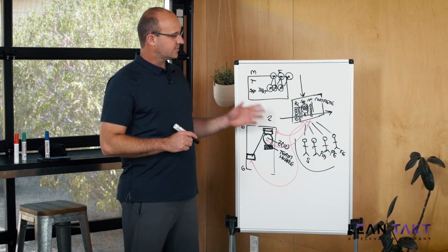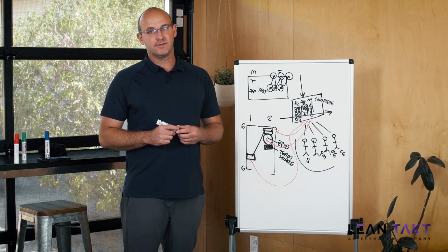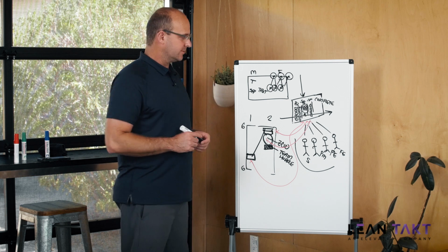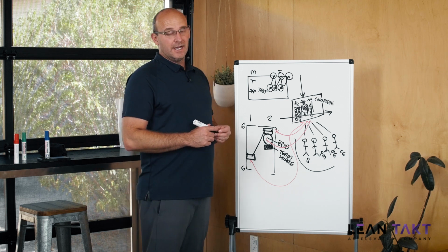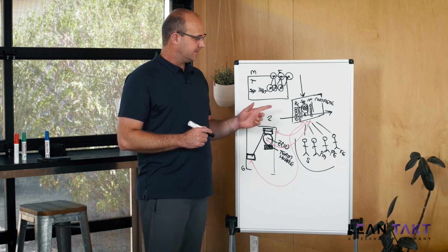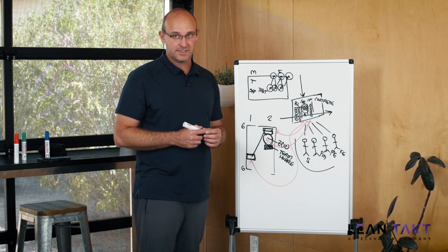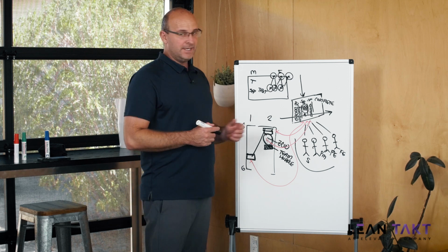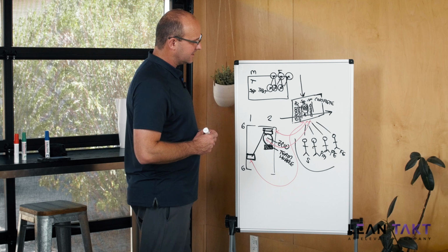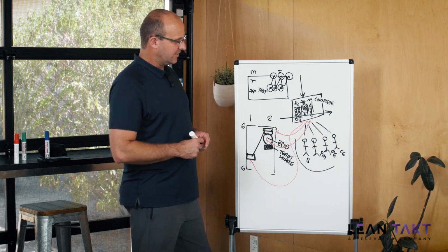Now, if you follow the Scrum framework, the superintendent is really, or the PM, but you adapt it to your circumstances, the product owner. I would really keep the superintendent as the product owner, meaning who decides what needs to be done to really make sure we're building the product in the field. The PM to be the Scrum Master with the people in the office taking care of these things, and everybody on your project management team is your development team, okay?